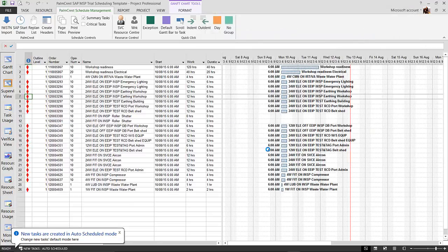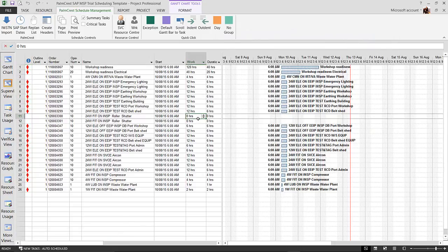Now, first thing you'll notice is how quick it comes in. And you'll also notice there's a bit of a gap here in the Gantt, and that indicates to me that, hey, there's zero durations there, or there's zero resources against a duration, which forces that. And straight away I can see, hey, look, we need some replanning here. So I've always said that a schedule is the eyes to the planning, and it can determine whether the planning is good or bad. But we'll talk about that in a later module or video.